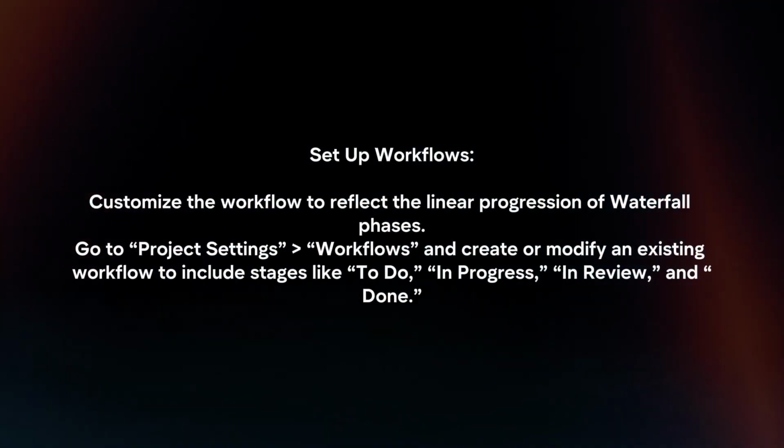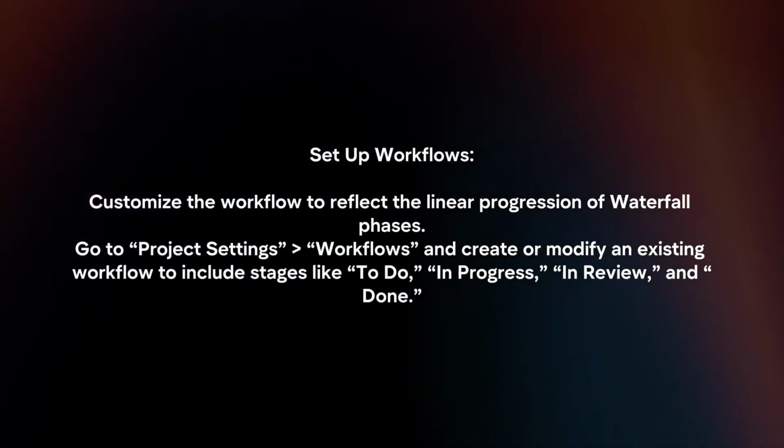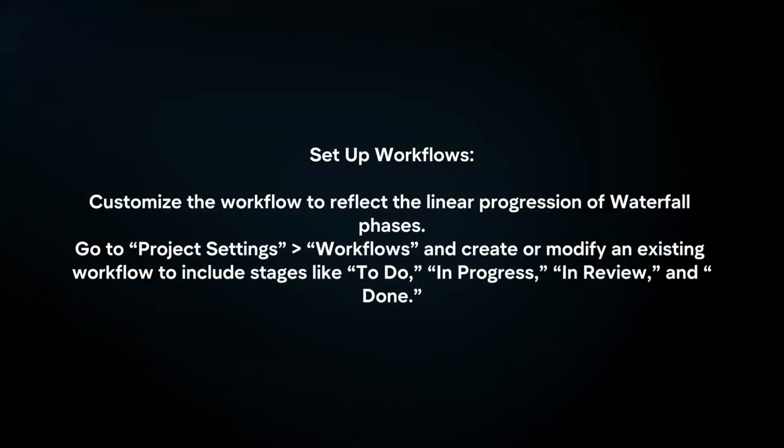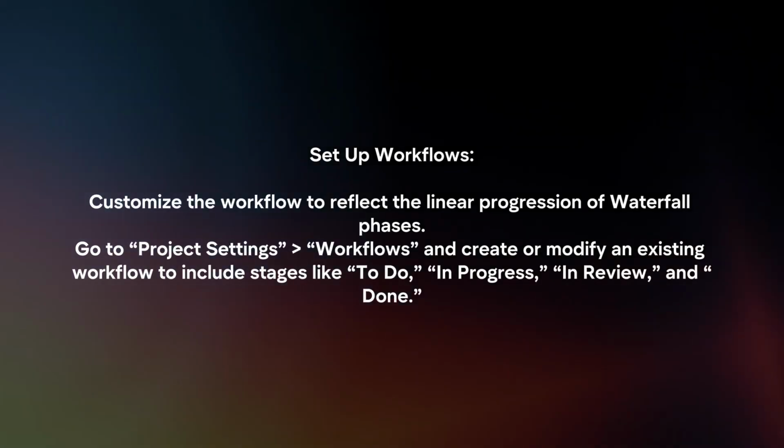Set up workflows. Customize the workflow to reflect the linear progression of waterfall phases. Go to Project Settings, Workflows, and create or modify an existing workflow to include stages like To Do, In Progress, In Review, and Done.